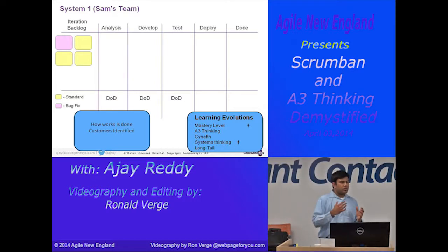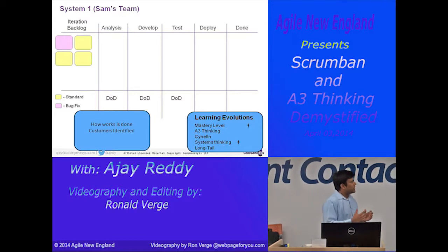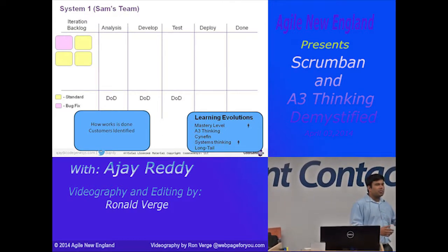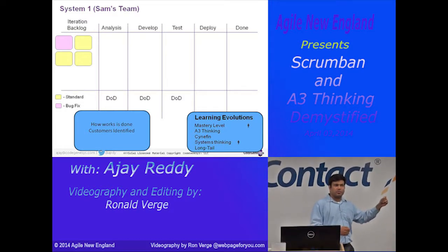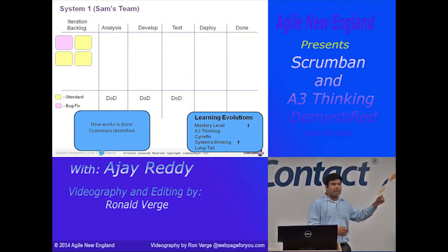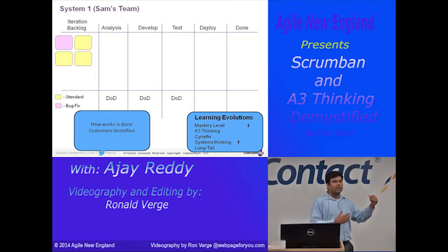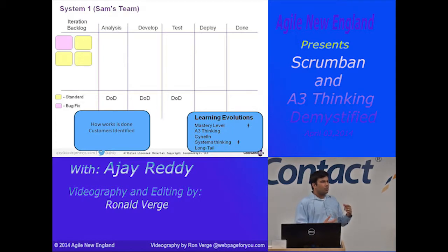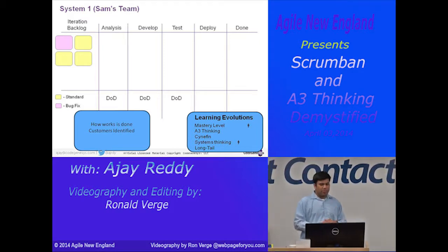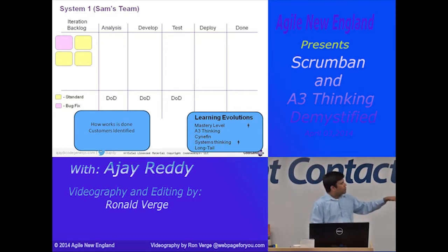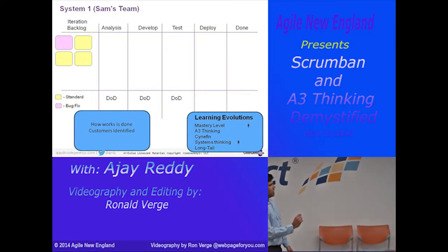It's important to note that when you see Kanban boards, typically what people tend to depict is just sort of handoffs. And that's a poor way of looking at Kanban boards. What you really want to understand is what information is getting discovered, or what value is being added, right? So they're developing that initial systems thinking mindset. So at the bottom right corner, you see that on systems thinking, they got one clip.